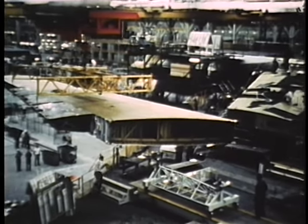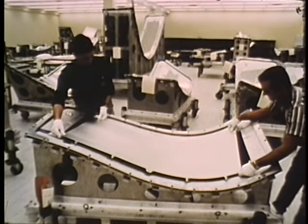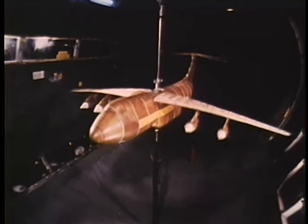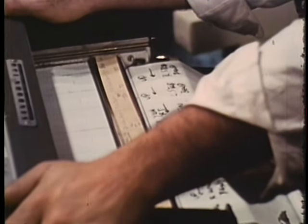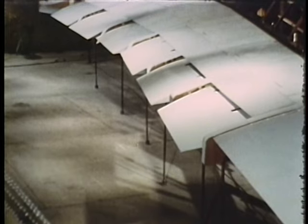The Avco outer wing sections must mate exactly with wing tips, leading edges, and ailerons manufactured by Canadair Limited in Montreal. We're doing nicely, but I must admit it's only due to the extreme project cooperation. You see, we started out with a high lift system. Then, rather late in the game, but as a result of continuing wind tunnel testing, Lockheed engineers found they were becoming critical on the three-engine climb-out. They wanted to trade off some lift capability for some freedom from drag to improve that climb rate. So they shifted to a Fowler flap system, which also changed the slat design.